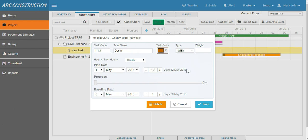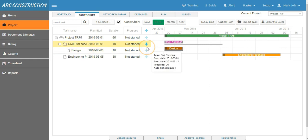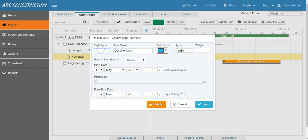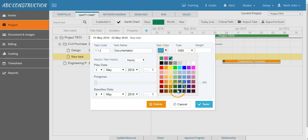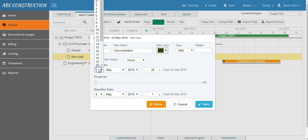Let's create task under level one, so click on the plus button. Say Documentation, give the task code, change the color if you want, leave the weight. Give the plan date for this task - say it will run 20 days and say it will start from 7th of May and save.